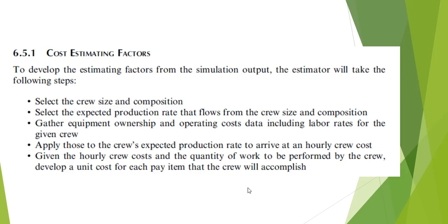And then you can go ahead and develop unit costs for each item of work that the crew will accomplish. Okay, so you're going to do a simulation, and then you're going to go back to the deterministic process we've been looking at earlier, and you can combine them to come up with unit costs.